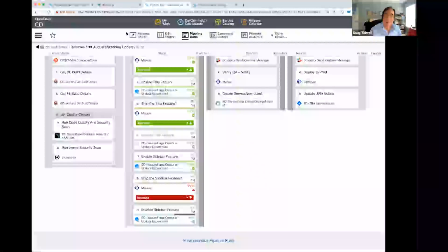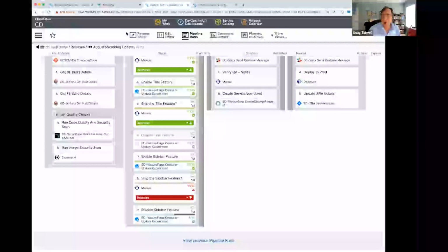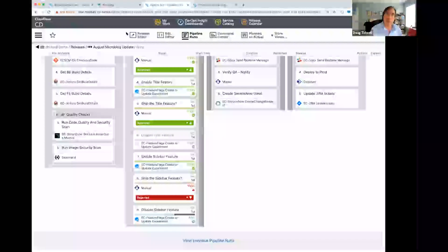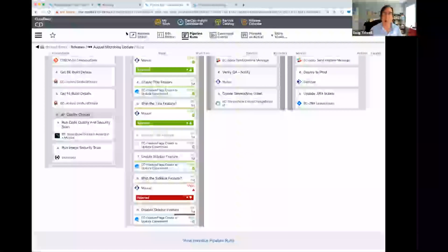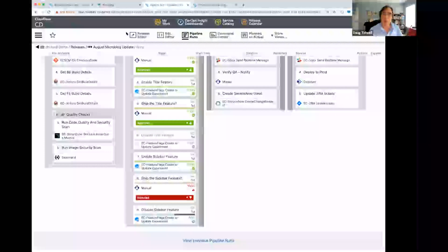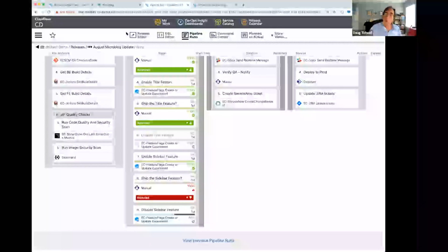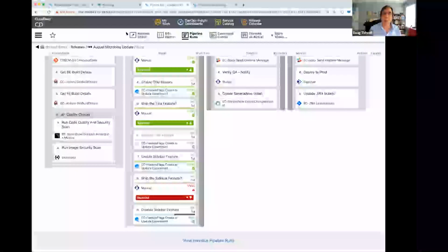In this case, all of the features that we're using are part of the release candidate, but I will leave you with one other use case. I was talking to someone from a bank that all of you have heard of. What they were saying they do is if they have, for example, a microservice that's going to be used by a new release, if for whatever reason a particular microservice isn't ready yet, what they will do is go ahead and deploy the code with the feature flag turned off.